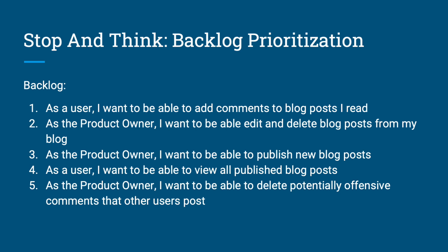First, I'd create a basic homepage with some mocked blog entries to display. This would be item number 4. Then I would add a button that lets me write a new blog post, item 3. From there, I would start to add the ability to edit and delete blog posts, item 2. At this point, I can probably start thinking about comments from other users.